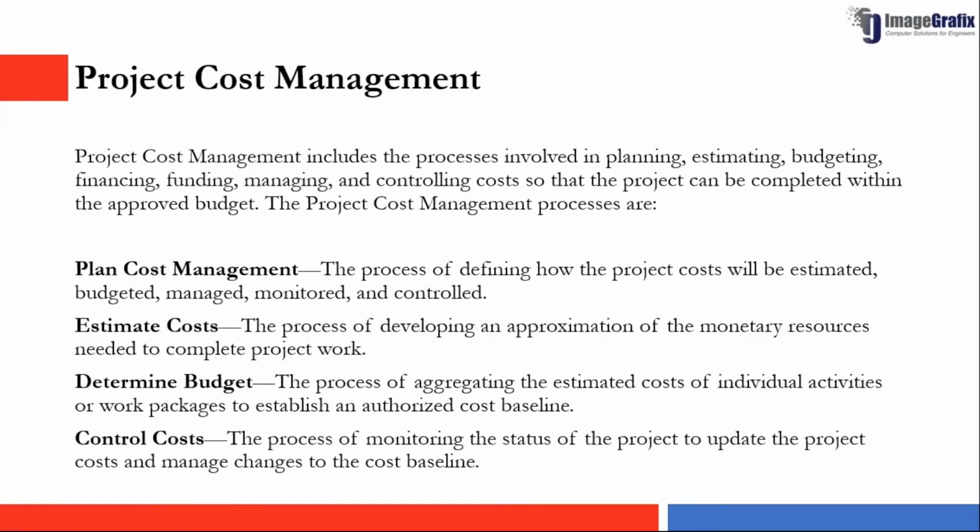So coming to cost management, cost management includes processes such as your estimation, your budgeting, your finance, and controlling your cost. So it starts from estimating, then your cost, then your budgeting. Budgeting will have your budgets, budget changes, budget transfers, in the controls, as well as your contracts, your POs, your invoices and payments. These are all part of our cost management. But normally when we talk about cost management in the construction industry, most of them will say they are using ERPs, or they will be using P6.